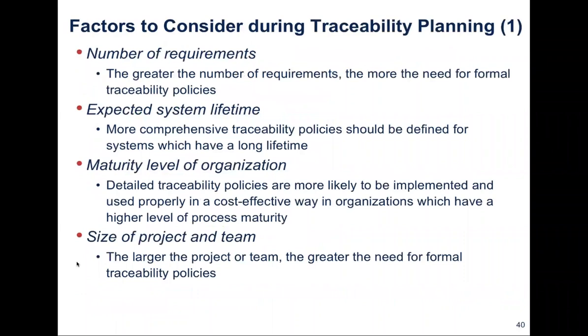We should consider the number of requirements. The greater the number of requirements, the more the need for formal traceability policies. Also, the expected system lifetime. More comprehensive traceability policies should be defined for systems which have a longer lifetime as compared to those systems that would have a shorter lifetime. Also, the maturity level of the organization.